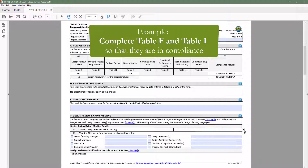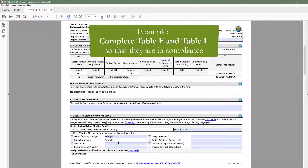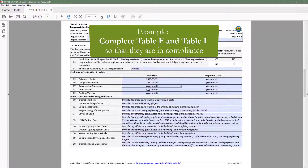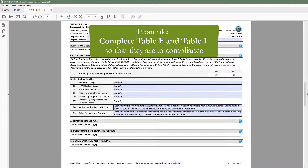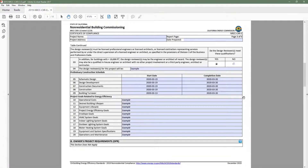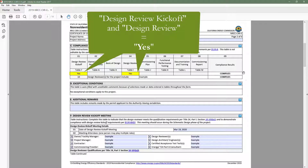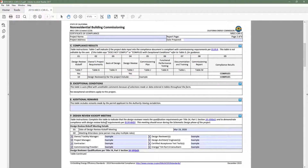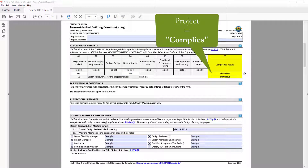For example, if we head to Table F and Table I and complete each table so that they are both in compliance, when we return to Table C compliance results, you will notice that the design review kickoff and design review columns in Table C indicate yes, and as a result compliance at the project level indicates complies.